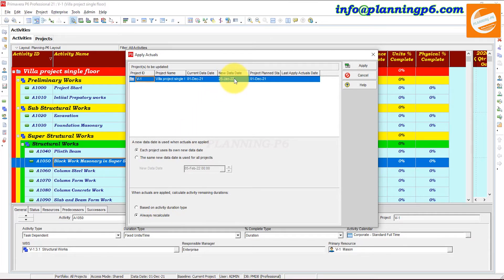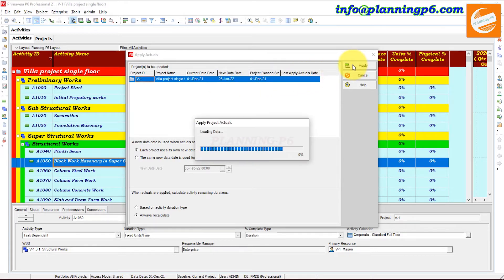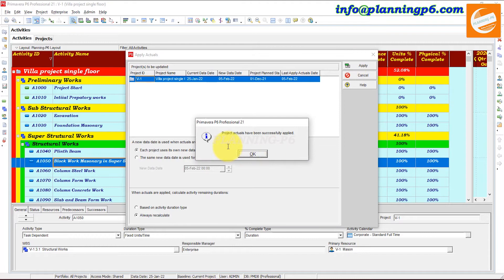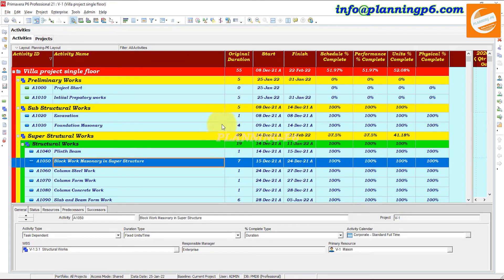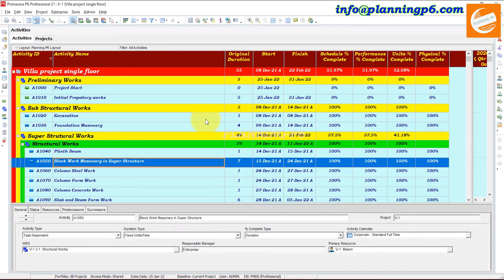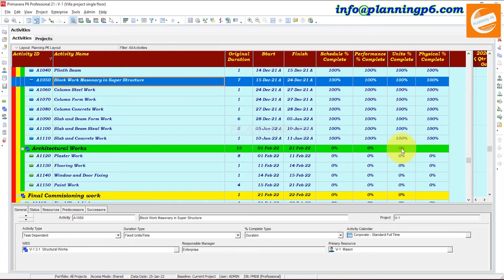So on 25th of January we are going to apply the actuals to our project. Simply click Apply Actuals — 'Project actuals has been successfully applied.' Now you can see our project duration has decreased: before it was 60 days, now it's 55 days, because we are applying as per actual. Schedule Percent Complete, Performance, Units, and Physical are all applied here.